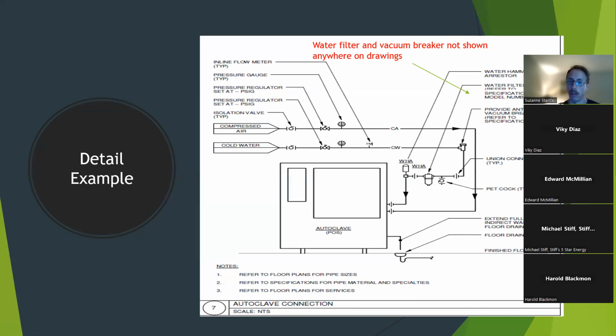So you're not doing this 30 different times, is the point. That's the point of an assembly. If something consists of smaller pieces, you take it off once, including all the small pieces, and then you go to your plan view and you count how many of them.